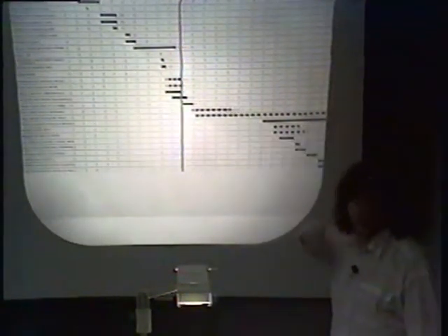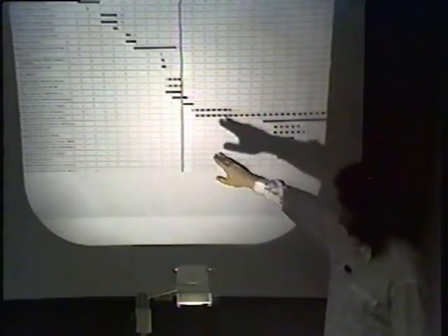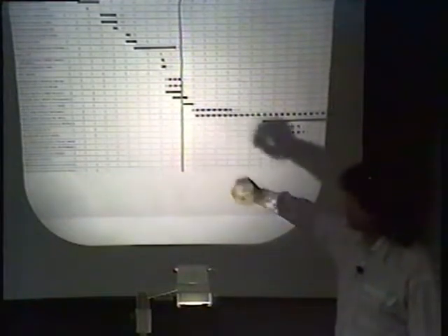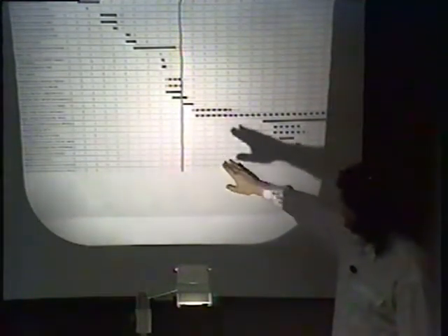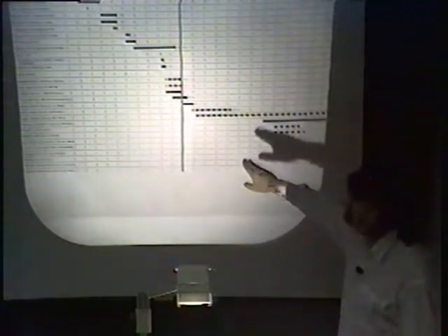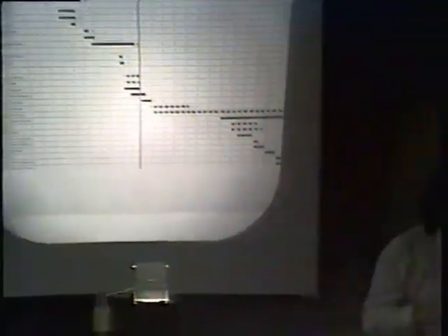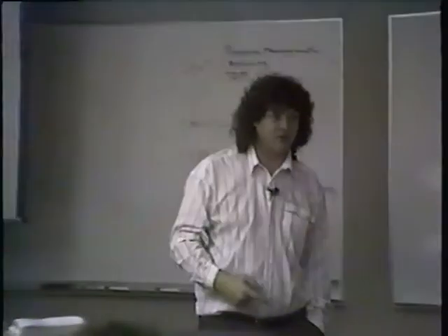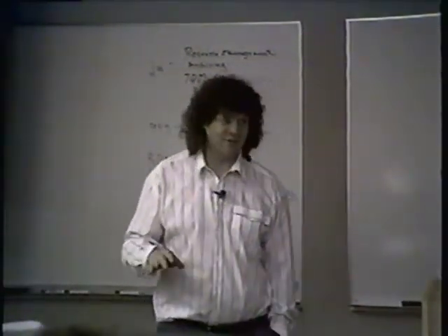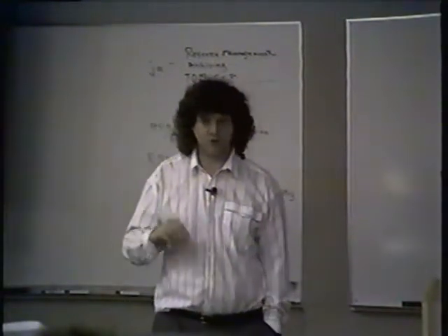Our systems programmers start doing their accounting stuff, and libraries people implementing theirs and presenting the interface that the users are going to see, getting that all tuned and ready. Start your UNICOS training. Start with some friendly users, some guinea pigs, that sort of thing. Then we've got the introduce UNICOS production service. This is occurring about 3 months after the install, where we're going from a pre-production mode to a production mode.